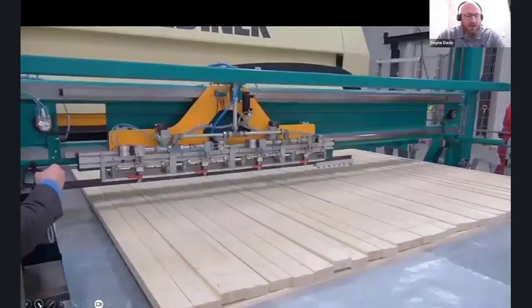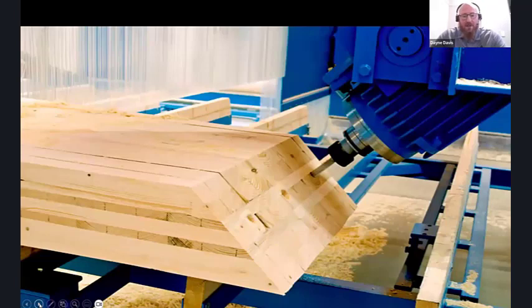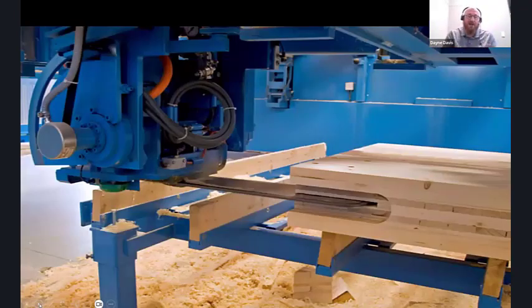And then, of course, fabrication. Most of you, I don't need to tell you how these things are made, but just some visual imagery of what it's like to make these timber elements and why it's so important to be working in 3D, because literally these elements are being made by robots, CNC machines globally, either locally in Australia or elsewhere. So we really had to think about this in depth and think of it from a more 360 point of view, because we couldn't leave things to a DNC on site. We had to figure out penetrations early. We had to think about procurement strategy.